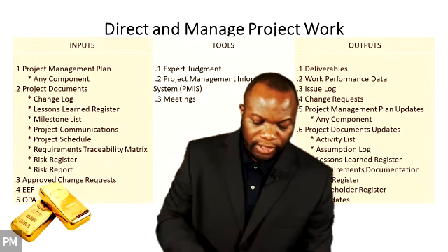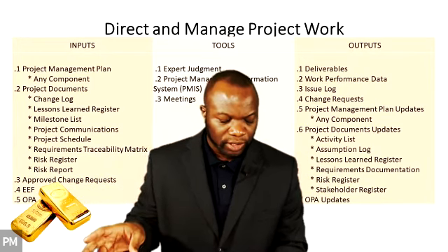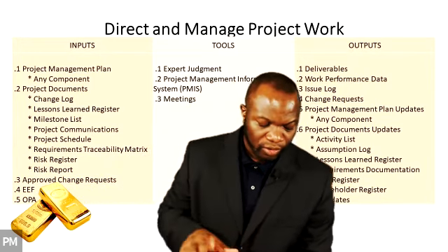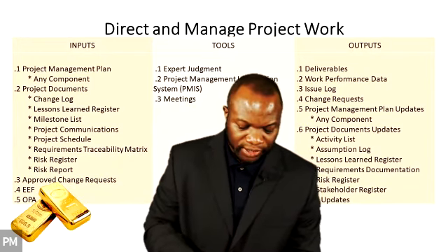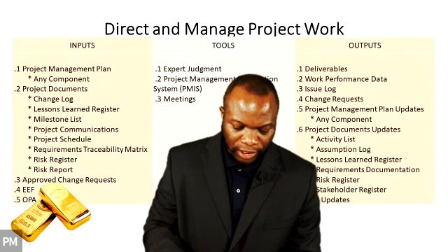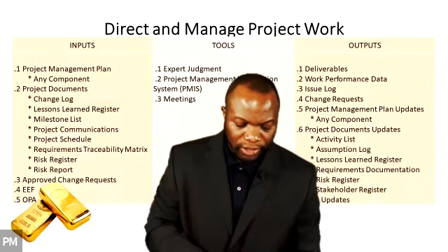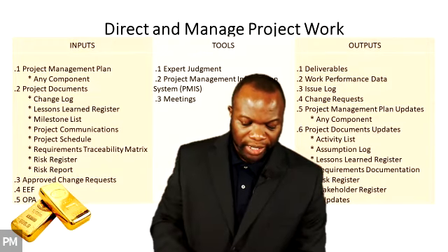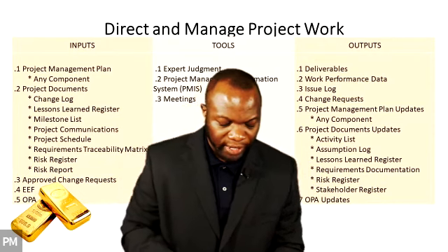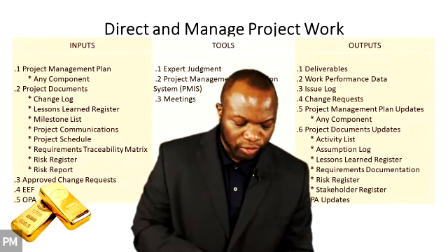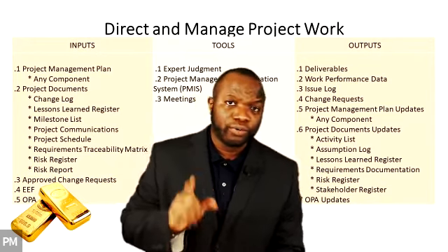See, it says the approved change request may be a corrective action, a preventive action, or a defect repair. Approved change requests are scheduled and implemented by the project team and can impact any area of the project or project management plan. The approved change request can also modify the formally controlled project management plan components or project documents.